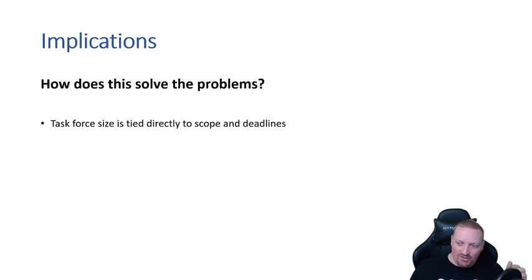So it just extends your deadline. Every new resource that you add to the team extends the deadline. But that only happens if the project is already ongoing, or if the team is already ongoing towards the deadline of this body of work.